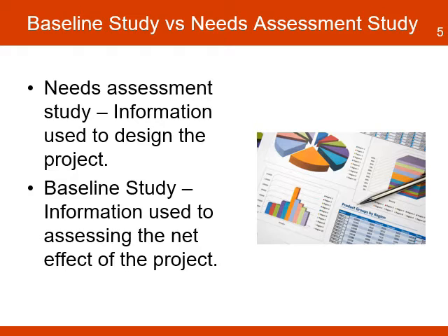What are the differences between a baseline study and a needs assessment study? Are they the same? A needs assessment study collects information during the design phase of the project and is used to identify areas of intervention. A baseline study collects information before the start of the project implementation phase and is used to track the progress of the project.